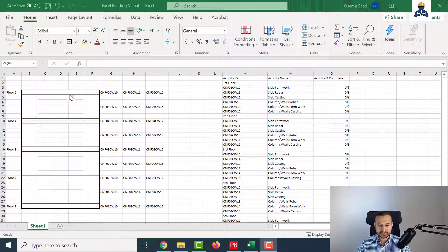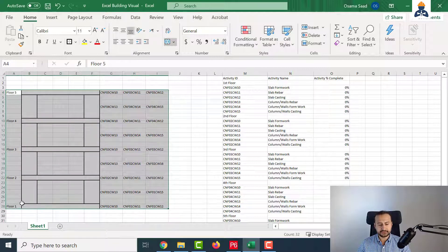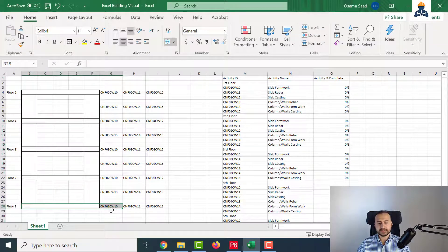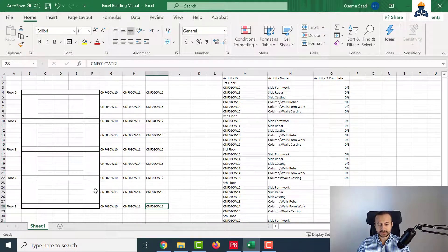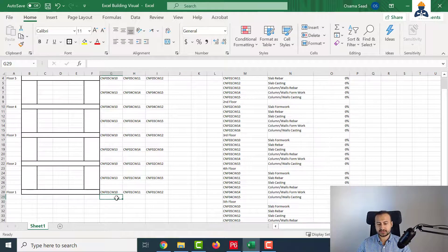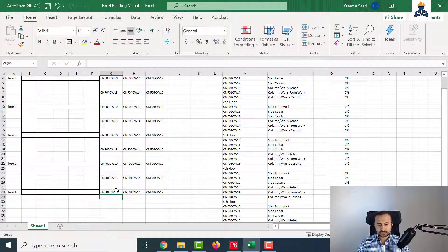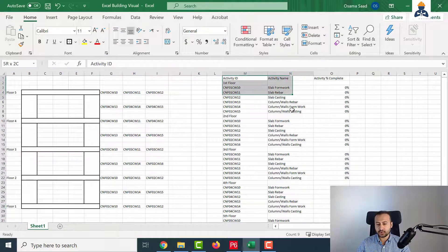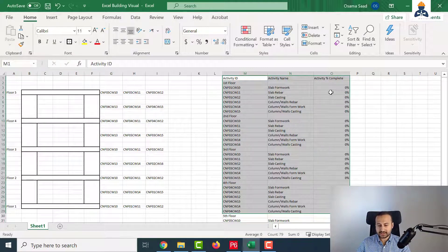Now I have done it for the whole sketch. Once you see this part of the sheet, you will understand that this is a slab, and this is the activity ID for slab formwork, rebar, and casting. For the columns: rebar, then formwork, then casting. The next step is we will show here the percentages from this table for each activity ID. I will use the formula VLOOKUP. By using VLOOKUP, I'm telling Excel to search for this activity ID in the whole sheet. And once it finds the activity ID, I want to ask Excel to show me the corresponding activity percentage complete.